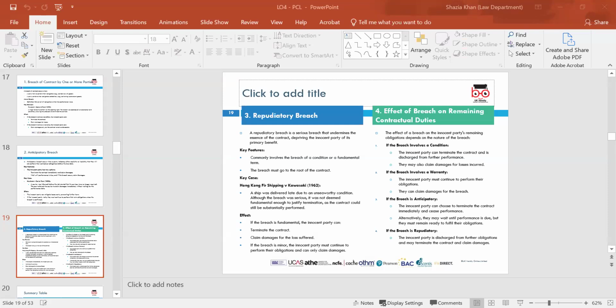A contract will commonly expressly state what breaches give rights to terminate and may also include procedures to comply with where there has been a repudiatory breach if the aggrieved party wants to then terminate. Failure to comply with the process can sometimes render what would otherwise be lawful termination of a contract unlawful, even if there's a clear contractual right to terminate. So you've got to be really careful when it comes to repudiating a contract.